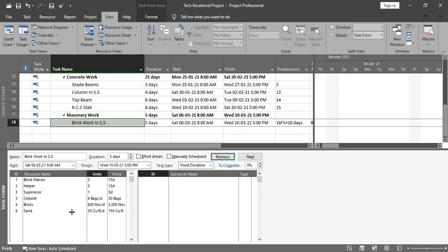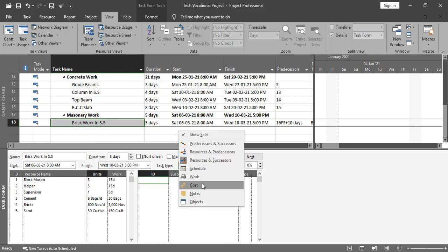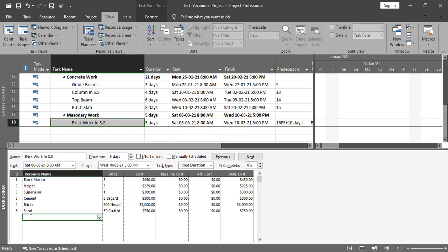Now next and the last, we need to add the hotel expense as well. In this regard, we cannot add the expense over here. Right click over here and go into the cost. Now go here, click over here and add the hotel expense. You need to add a hotel expense right over here in the cost column.